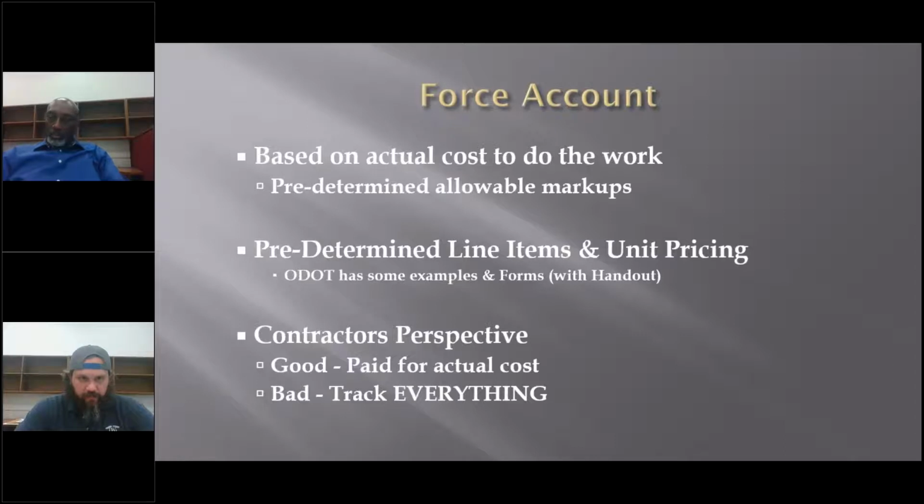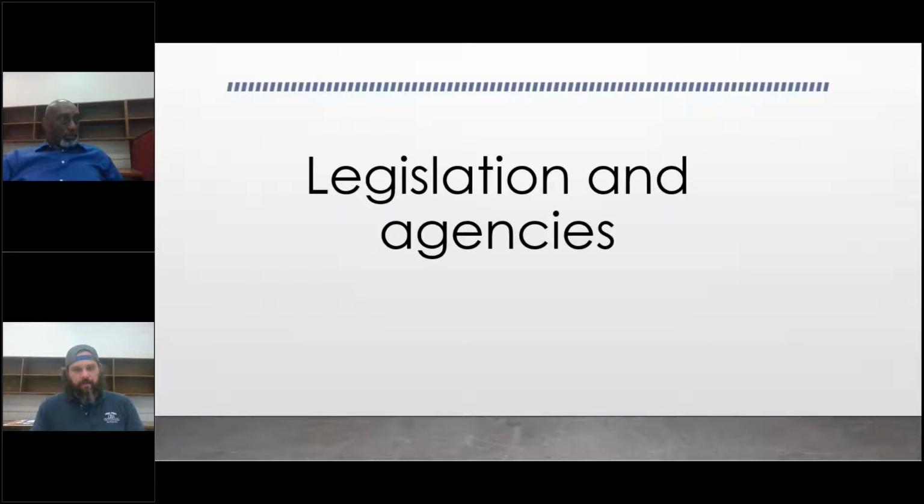So from a contractor's perspective, that can be great because you're paid the actual cost plus a little bit of markup on it, hopefully, depending on how pricing is going. If pricings are somewhat standard as compared to how they've been for the past year, where everything's been increasing almost exponentially, it seems, on steel and wood and everything that we're seeing these days. And the only bad part about it is that you have to track everything, and you have to make sure that your systems are in place and your guys in the field are really good about making sure they get you accurate quantities of what's happening out there. And then from there, I can hand this back over to Sam to talk about legislation and agencies.